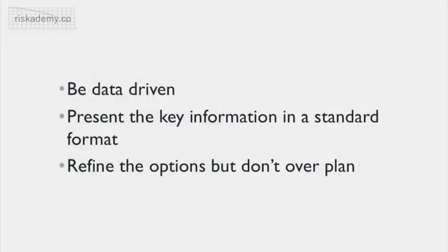There are 3 additional points to consider when developing strategies. First, be data-driven. Present the key facts and figures to help compare and weigh the different options available. Include a comparison of the initial or raw risk versus the estimated post-action risk. Include an outline of costs, resources, and time required to help with cost-benefit analysis.